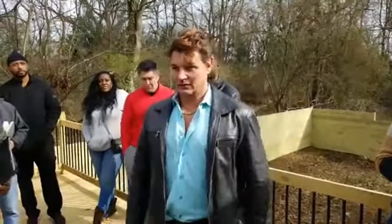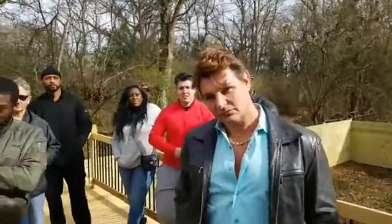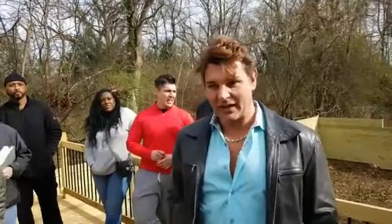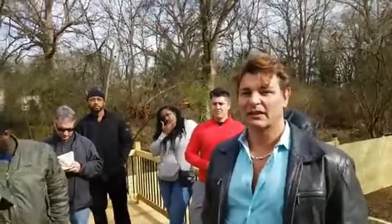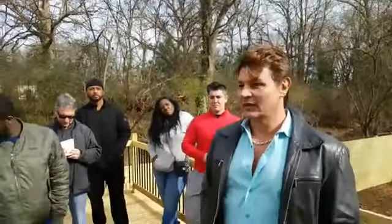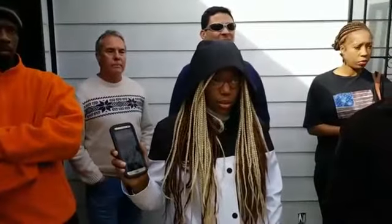Those are the core guys that can do anything for me if I need it done. Part of his question was, this is obviously the one we're looking at now, a $90,000 rehab. What is average for you these days? I would say 60 to 90. A lot of the ones I've seen you do lately are the big full rehabs. Is this a full electrical, like a new electrical? Yeah, everything's electrical. And how much was a full electrical on this? $3,500 for a rough. Really? My little house, someone quoted me almost $8,000. Maybe because I'm a girl.